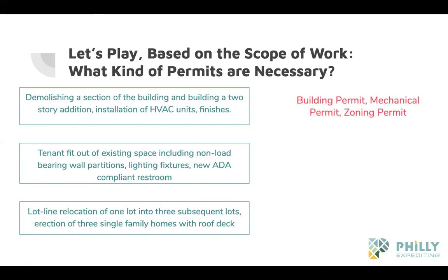And a zoning permit, right? Because whenever you demolish and when you add an addition, it's zoning. Sure. So, yep. Tenant fit out of existing space, including non-load-bearing wall partitions, lighting fixtures, and an ADA restroom. Building permit, for sure. Anything else? Lighting is, oh, electrical. I see, picture of electrical.